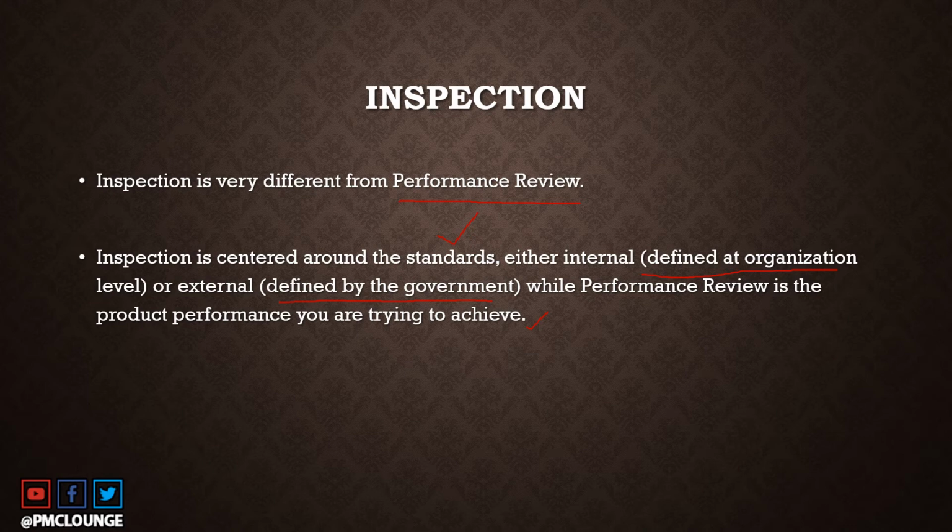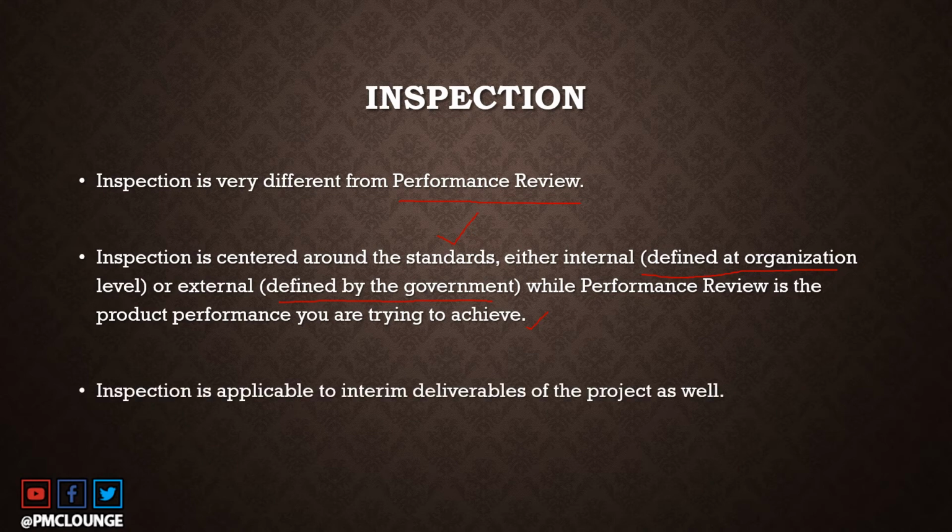So that's the difference between inspection and performance review. Inspection could be applicable to interim deliverables as well. Your battery needs to be waterproof as well. So interim deliverables of the product of your project might also have to comply to standards. And like I said earlier, performance review could be something very internal to your project, something that you are trying to achieve as part of your project.